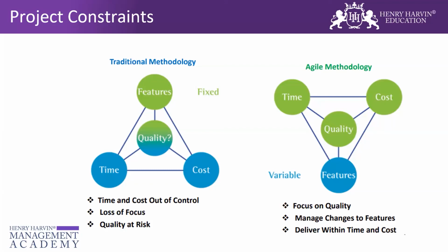Okay. See, in any industry, if you are not engaging your customer at the right time, here is how cost overruns used to happen in traditional waterfall. Suppose feature development has taken more time. My quality team is already sitting idle, waiting for something that has to be there. There was some kind of challenge in development, or the server was not available, or any kind of issue. So the complete life cycle down the line is hampered.